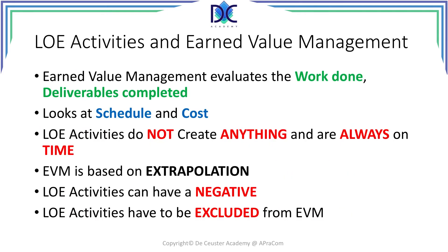Let's have a look at the effect of level of effort activities on earned value management. Earned value management looks at the work done and the deliverables that have been completed. It evaluates the schedule, timing information, and the cost of the creation of those deliverables. Level of effort activities do not create anything. They are always on time and the cost depends only on the amount of people assigned to project management activities or the number of quality controls performed. They do not relate to the work that is being done.